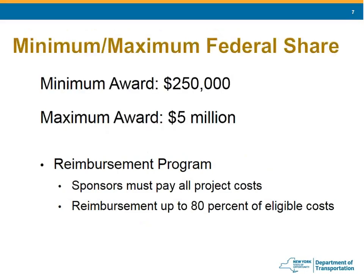The minimum award per project is $250,000 and the maximum award is $5 million. The federal share is capped at the amount requested and limited to reimbursement for eligible items only. These programs are reimbursement programs, meaning the sponsor will pay all project costs first and then be reimbursed at 80% of the eligible cost. All applicants must provide the 20% match. These projects are not eligible to use Marcheselli funds as part of the local match.